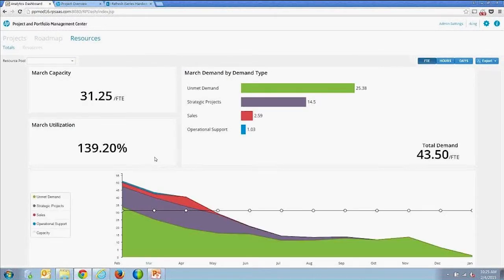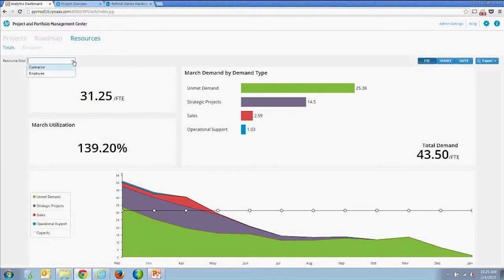The third piece is the resources tab, focused on demand versus capacity of overall resources and their associated utilization. The filters are configurable — we've set this up with roll-up resource pools and child pools.